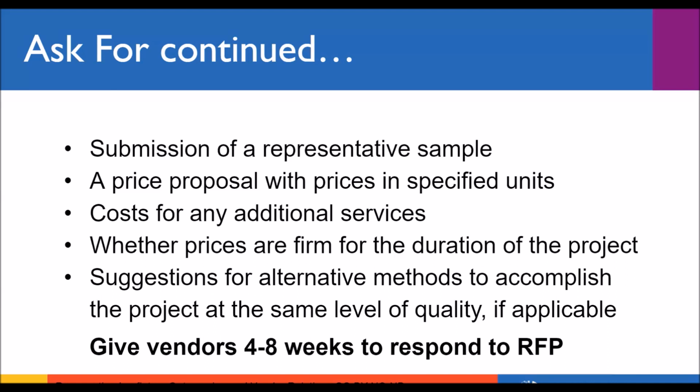You will want a price proposal. Not only will you want a price proposal, you want to know, obviously, how much you think this is going to cost, but you'll want those prices to be in specified units of measurement. So is this per page, per item, per minute? And how are they coming up with this number and how accurate do you feel like that number is?